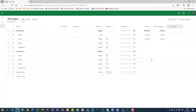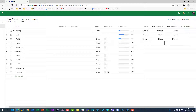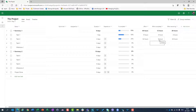If I add Effort Completed and Effort Remaining columns, I can say I fulfilled 4 hours — and it will calculate that the task is 50% complete. But if I enter 8 hours, it will be 25% complete. Percentage of completion is calculated based on effort and effort completed: if I complete 8 hours out of 32 required hours, the percentage is 25% because 8 is 25% of 32.